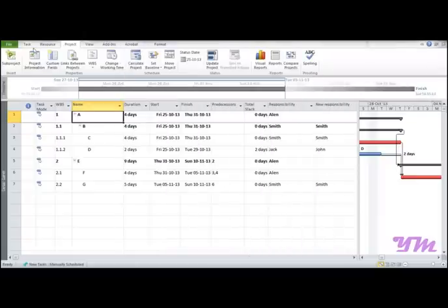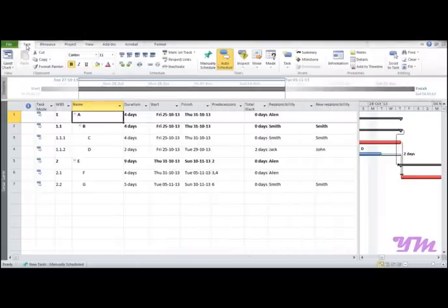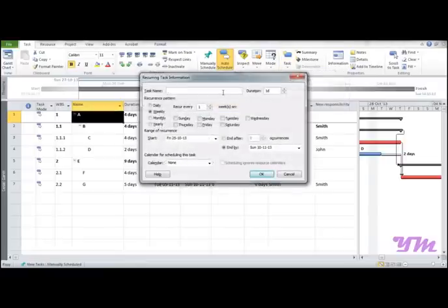In order to do that, go to the task menu, go over here under the tasks, we can see a small arrow, click on it, go on to recurring task. Now over here you can enter the name, let's say inspection. Here you can mention the duration for which this activity or task would last. For recurrence pattern, we select weekly or monthly, whichever is required.